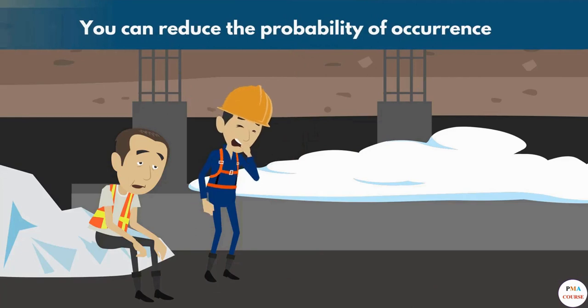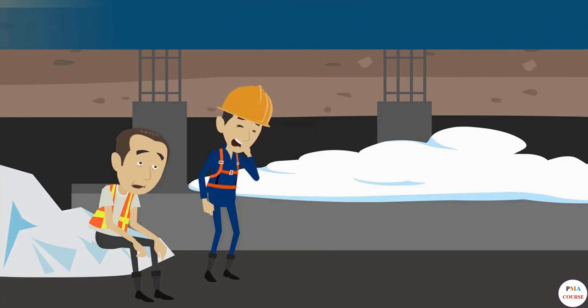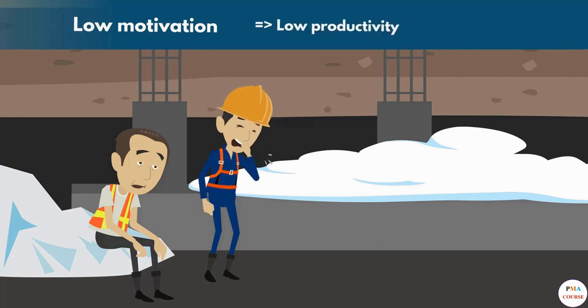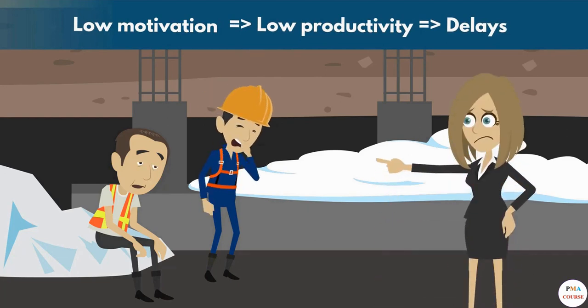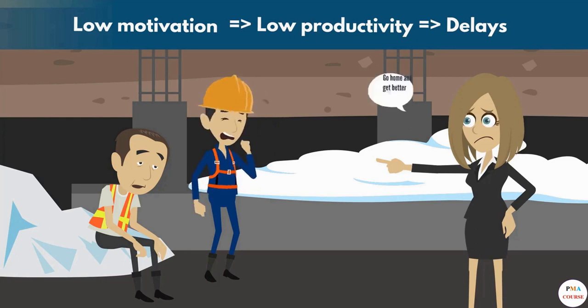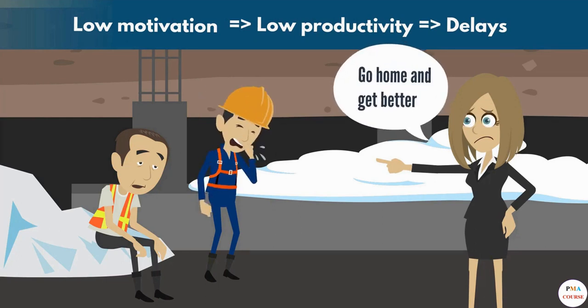If you have noticed low motivation from a member of your team and their low productivity risks causing delays, then you can be proactive in motivating them by identifying any problems they may have or by incentivizing the work. And if during the project you find these methods have not worked, you can let the team member go or employ an extra pair of hands. Now, as you can probably guess, these methods can be combined and personalized as required by the project.